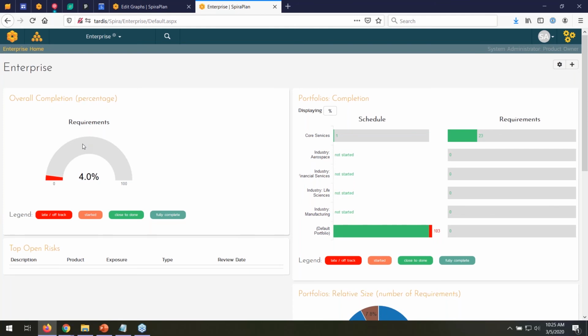And I can also see, based on the dates of those releases, not only how far along we are in terms of the work completed, I can see how close the end date is, should we be done by now. So in these graphs, you're going to get an indication, not just how far along you are in terms of completion, but how that relates to the date ranges. So for example, you might be halfway done with your requirements, but the end date's tomorrow. That sounds like it's going to be red. However, you might be 10% done, but all of your end dates for all of your projects are like 2 years from now. Well, then it'd be green, even though it might be a smaller percentage. So we're showing both the schedule and the completion and bringing those metrics together.